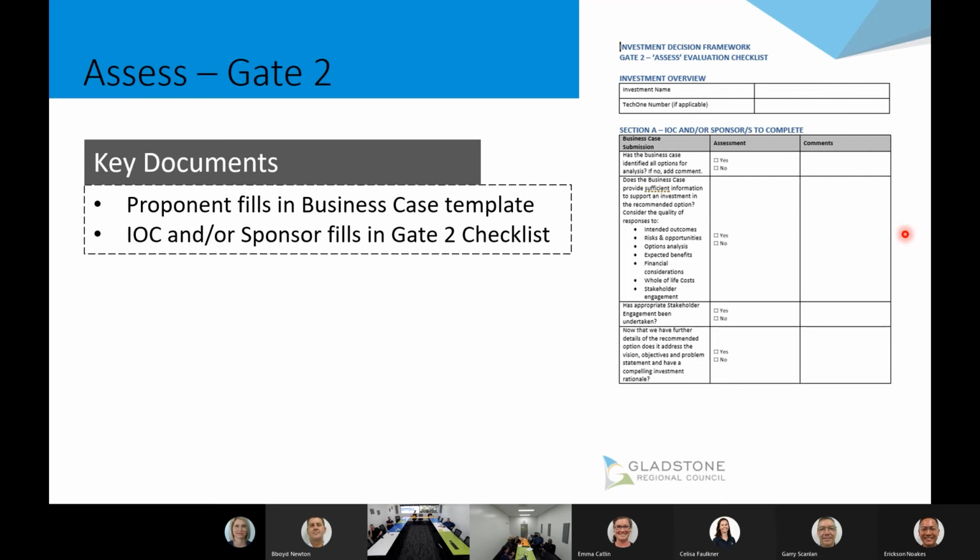So we've got approval of our business case. At this point is now where we're considering we've got a project, for all intents and purposes of how people think of projects. And at this point is where we start the project management framework and enter the capital portfolio. We hand over from a proponent to a project manager now.